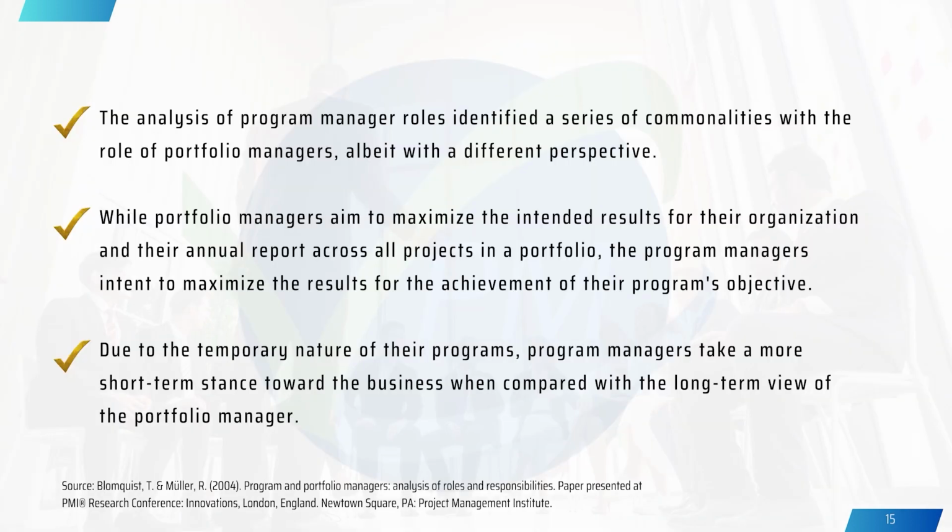The analysis of the program manager's role identified a series of commonalities with the portfolio manager's role; both roles look very similar. Whether portfolio or program management, we're talking about multiple components, dealing with multiple projects and programs. The difference is that at the program level we are looking for interdependencies among the components, whereas in a portfolio you may or may not have any interdependency.